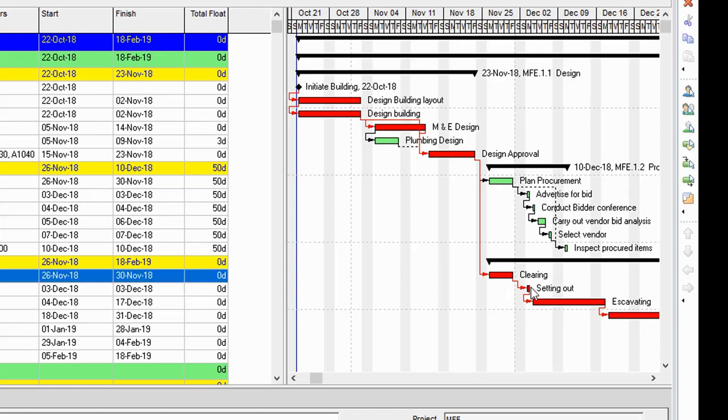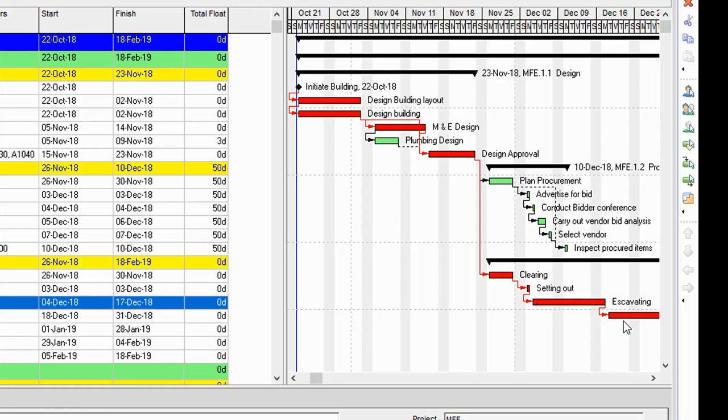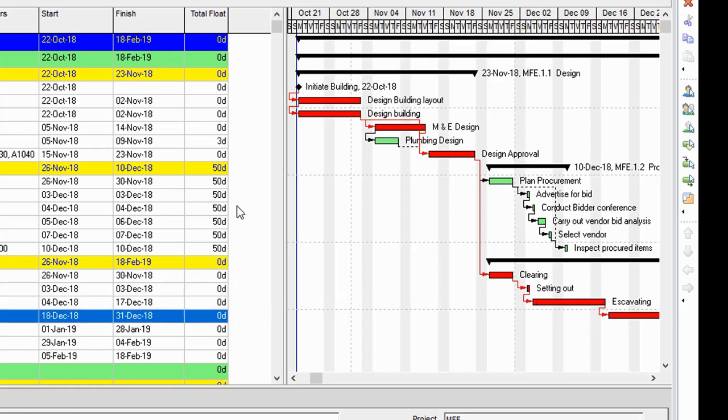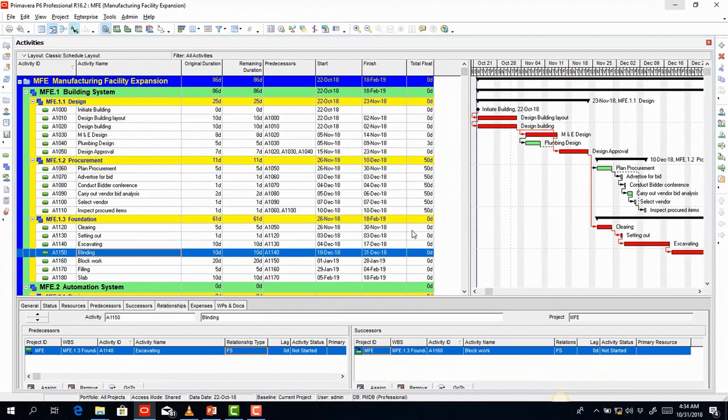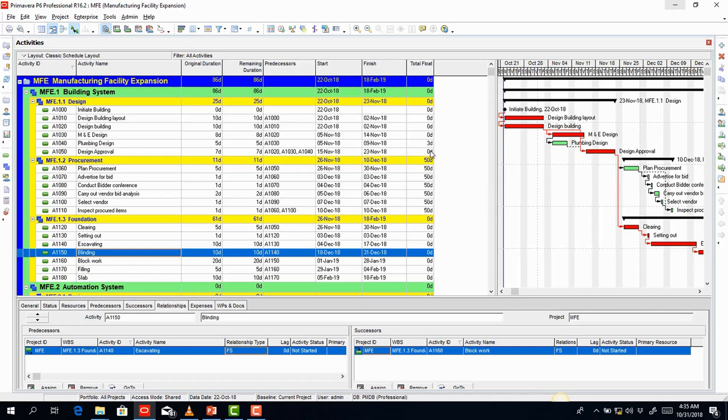And if you look at the other activities that are red, those are activities on the critical path, and you will notice that they all have 0 float. Now, when we talk about the free float, which is part of what we saw earlier, free float is how long an activity can be delayed without affecting the start date of a successor activity. That's essentially what the free float represents. So you can also choose to see your free float. The essence of why this is necessary is for you to know, for each activity, how long it can be delayed so that it doesn't affect when the successor activity is slated to begin.